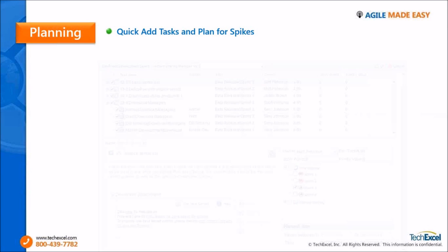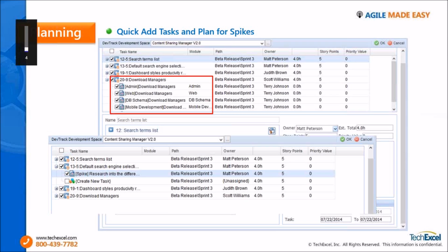Every time you create a new user story, a set of default tasks is automatically created, and the default estimated total and owner are automatically defined. This can all be template based, which made our sprint planning meetings more efficient, because all we had to do was select the user stories we want to implement in that sprint, and each was automatically broken down into tasks with ownership assigned.